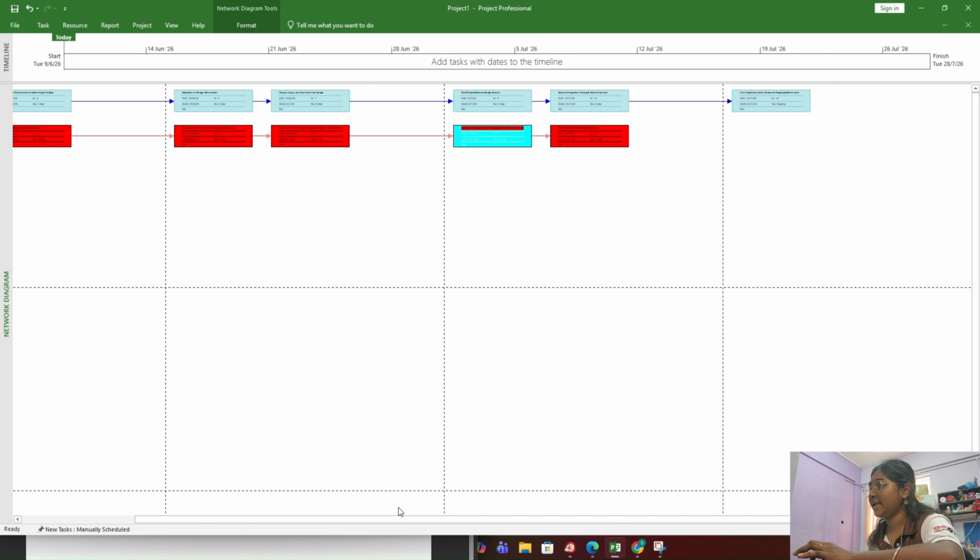So actually activity 5 is the predecessor of 4. So as I told before, after activity 5 is completed, the project branches into 3 parallel tasks that can actually run simultaneously, as we can see here. This is called the fan-out structure, and it helps us save time, allowing multiple activities to complete at the same time. So these red activities represent the critical path. That's why we changed the colors, to compare.